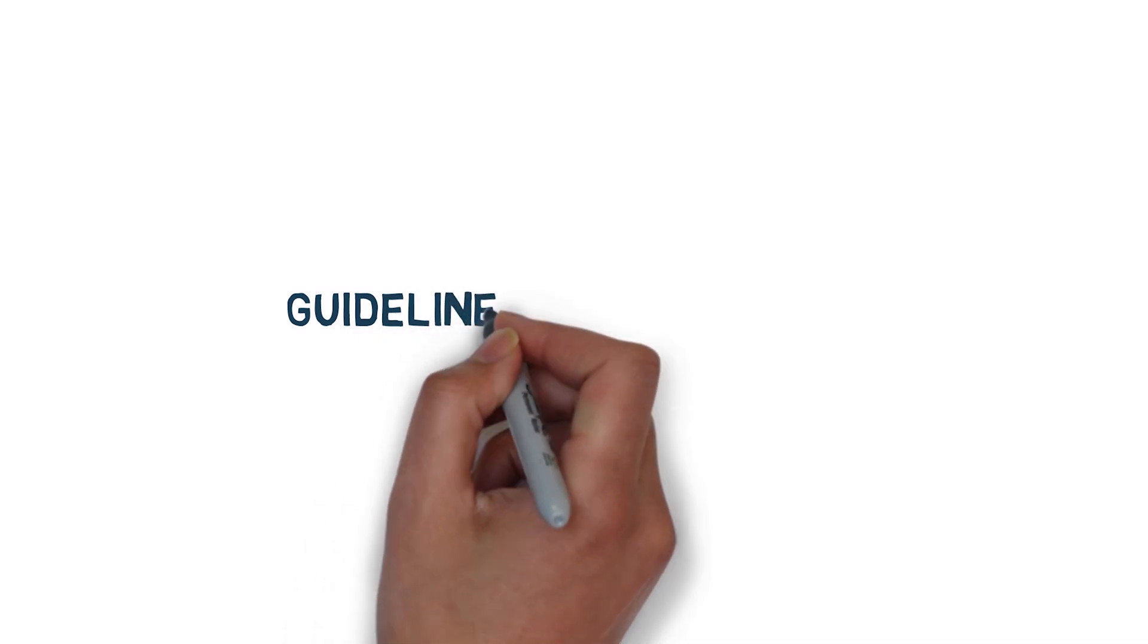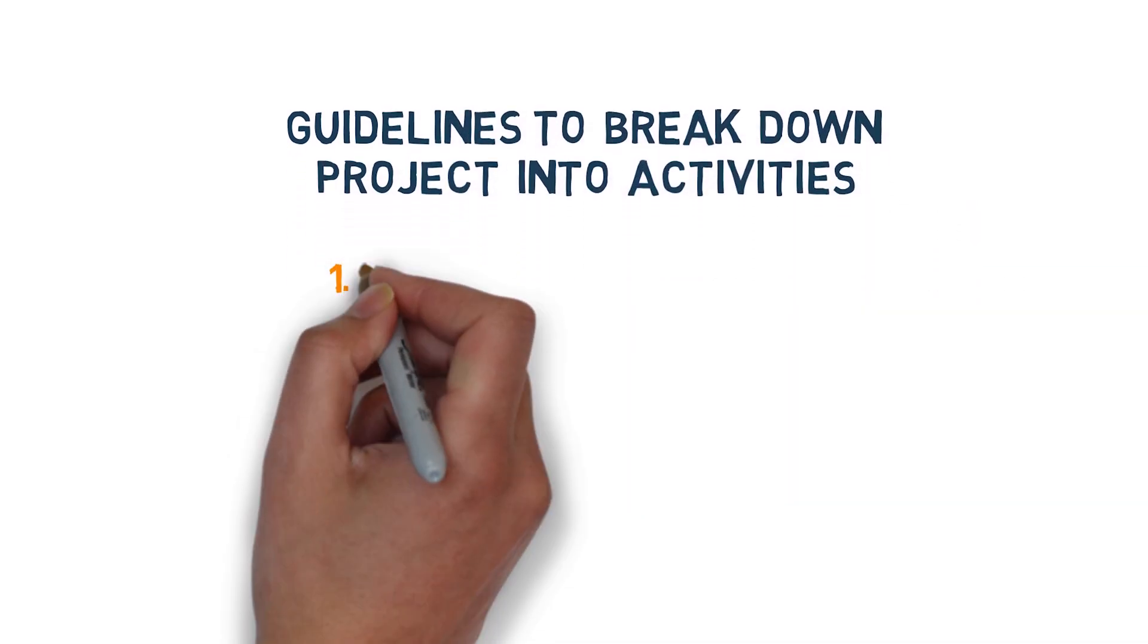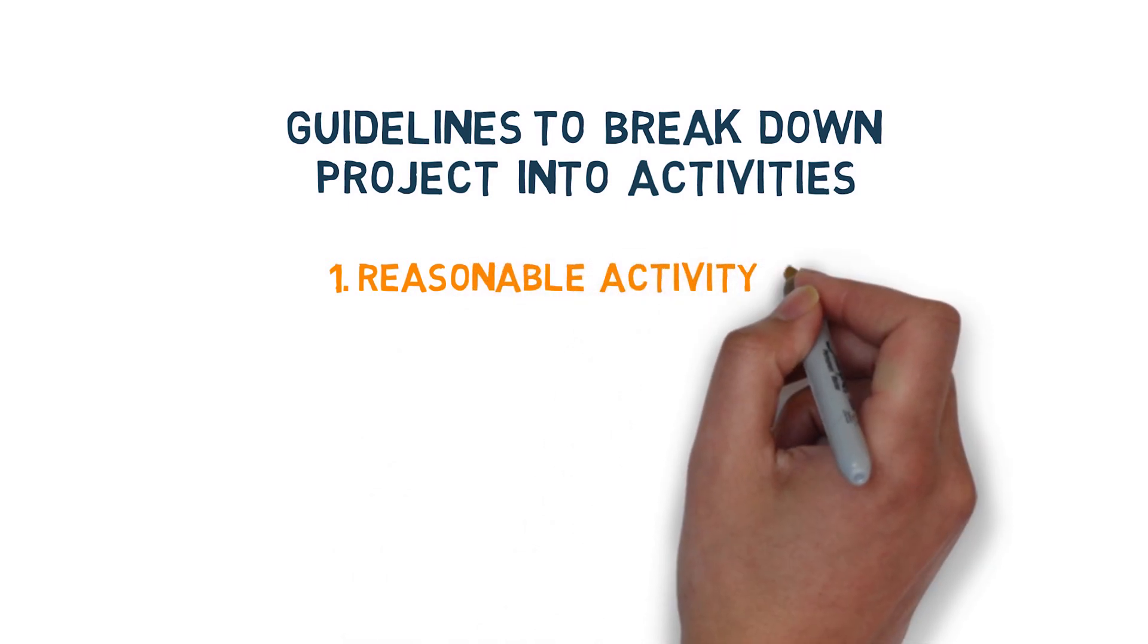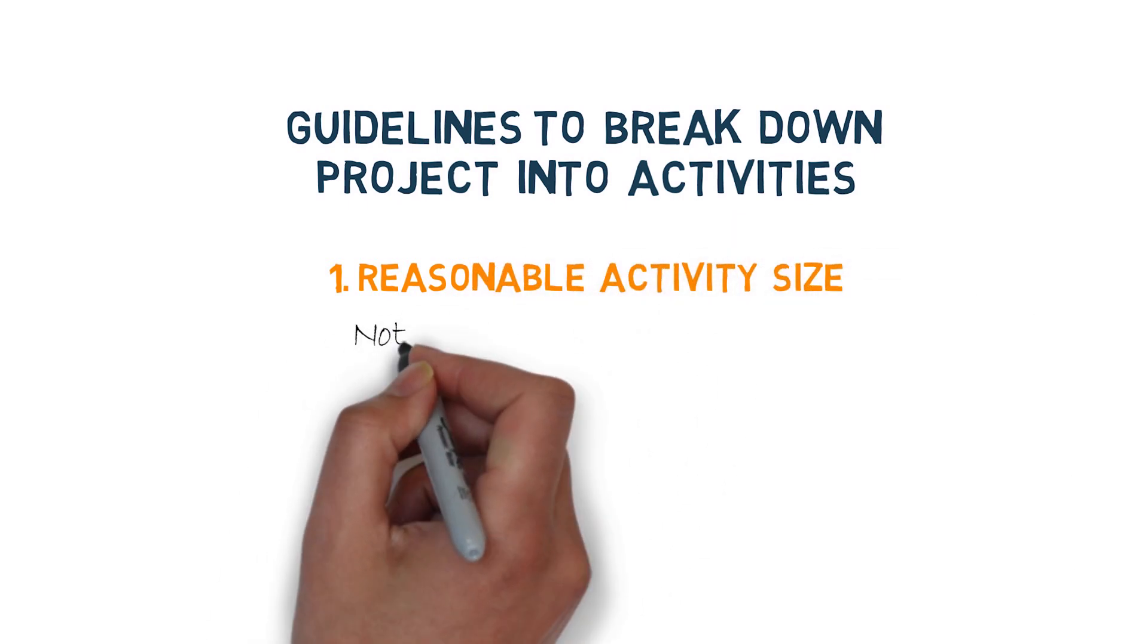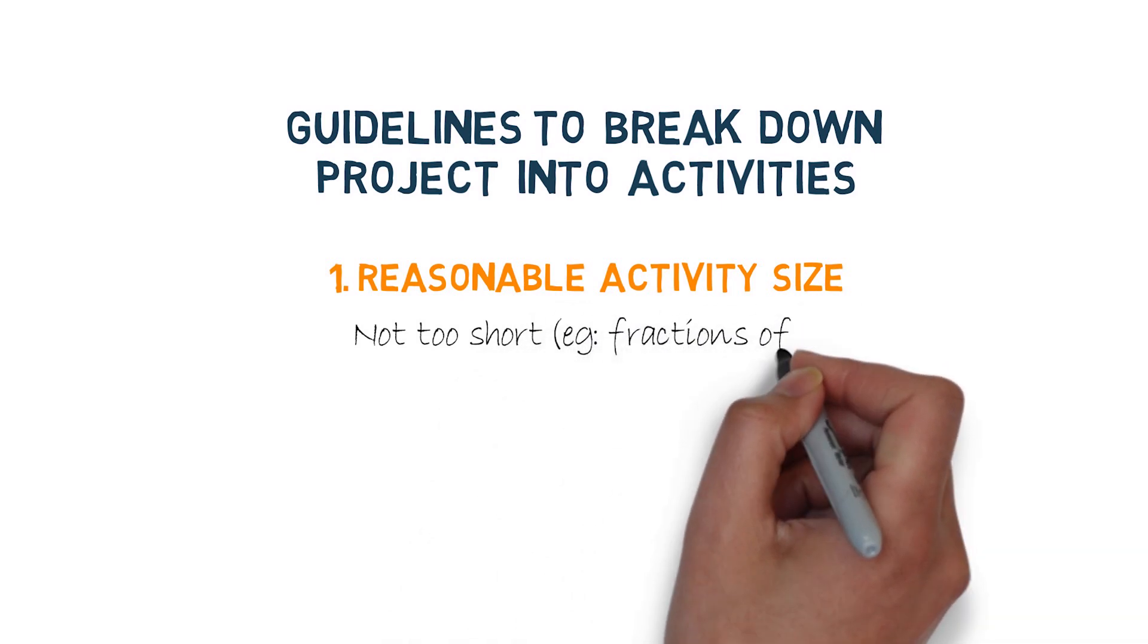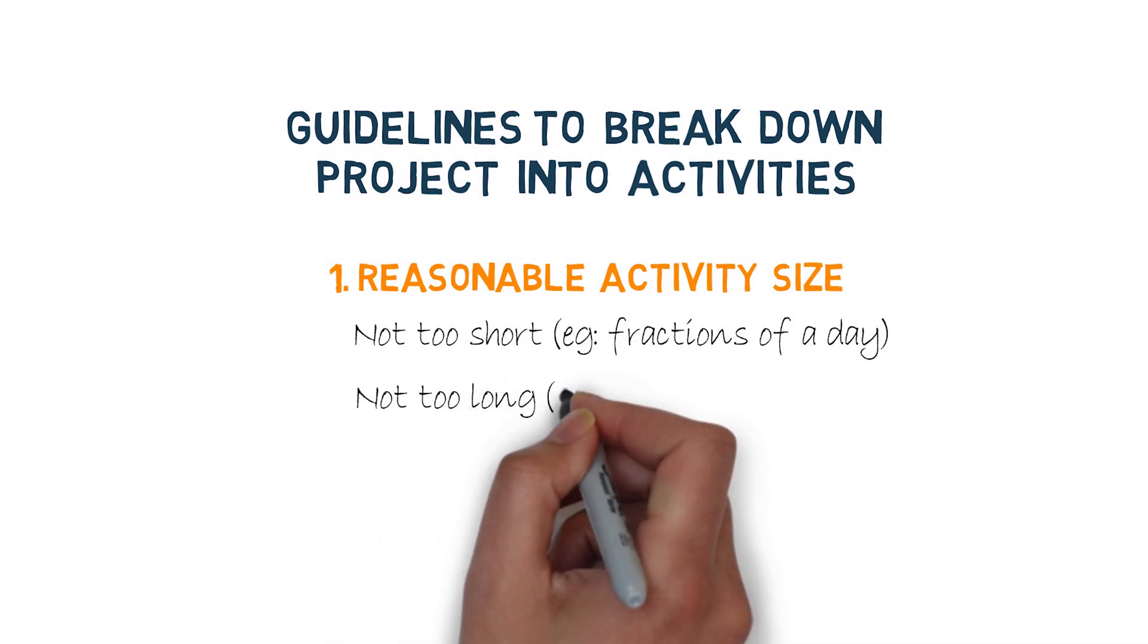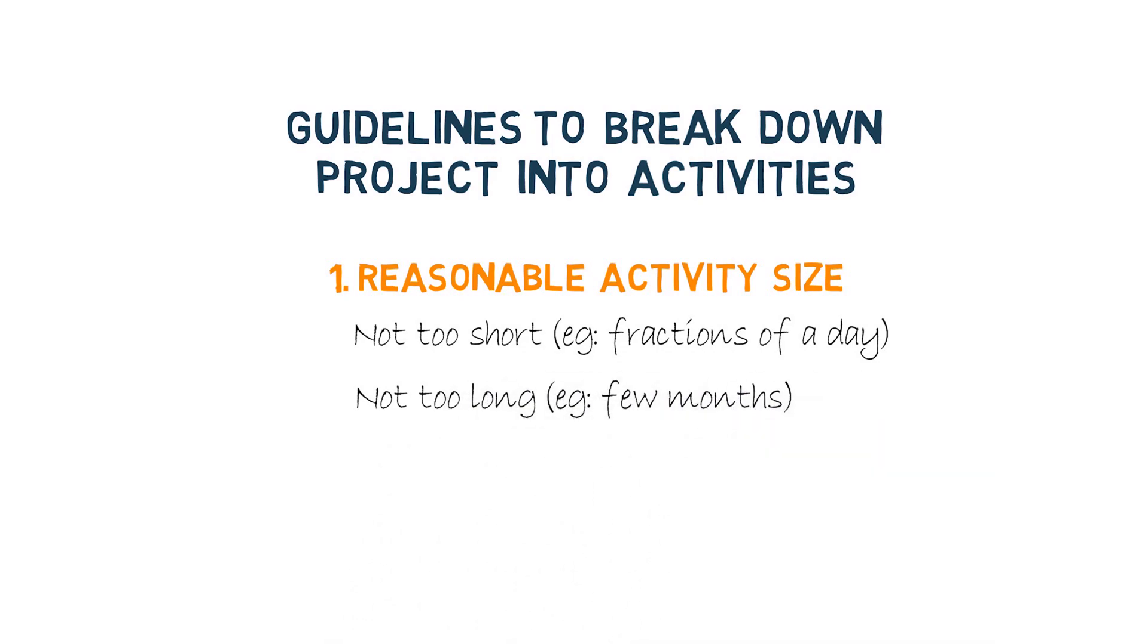However, there are guidelines on how big or small an activity should be. First is we need to have reasonable activity size, and since we are using day as a unit of time measure, don't make an activity too small that is a fraction of a day or like couple of hours, or don't make it too long like few months or a quarter.